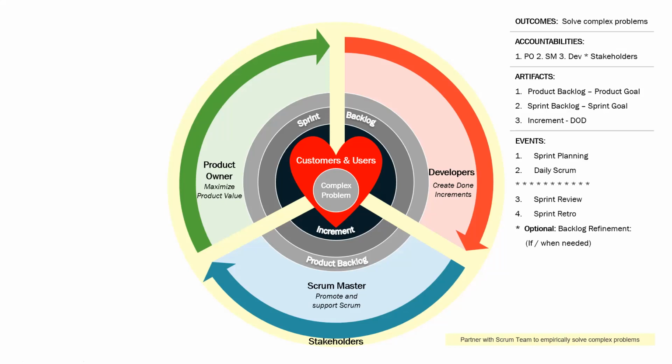Sprint review is followed by a retrospective where the Scrum team gathers in a safe space to reflect upon what happened in the recent sprint, what worked well, what could have gone better, and what adjustments they might consider in the next sprint. These events are encapsulated in a container event called the sprint. And after sprint retrospective, we move to the next sprint, rinse and repeat.